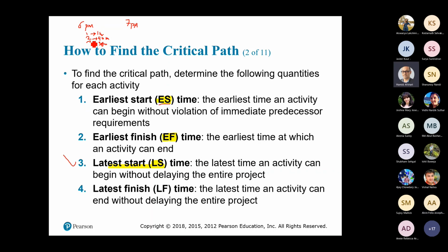6:15. 6:15 is correct because it takes 45 minutes and it should be finished before 7. And what is the latest start for the third person? 6:30. That's right. Okay.